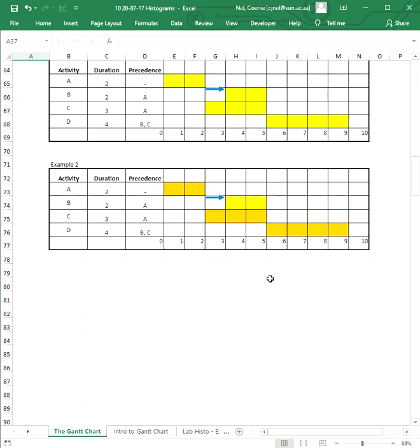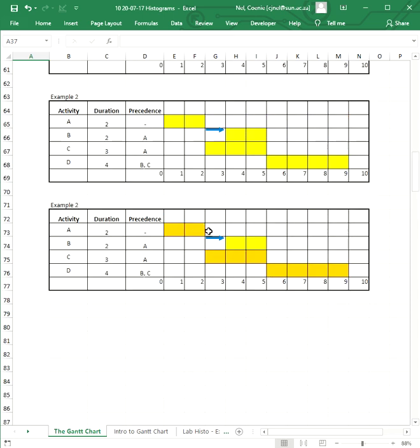And then if you do that, you'll see there are some activities which you cannot move in the project. And those activities we call the critical path in the project. They are fixed. And that is very important because in the next section, you need to know which activities are going to be your critical activities and which activities you've got float on.